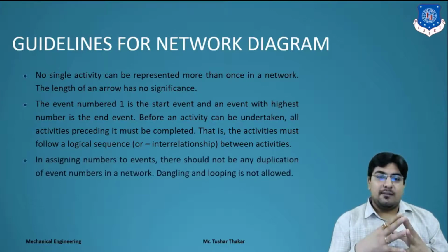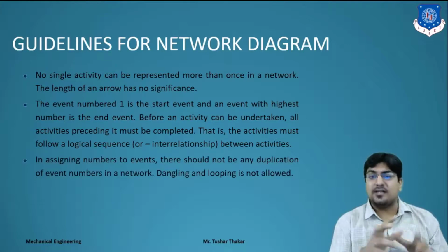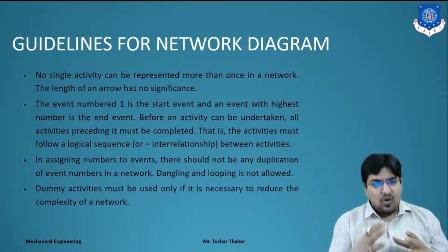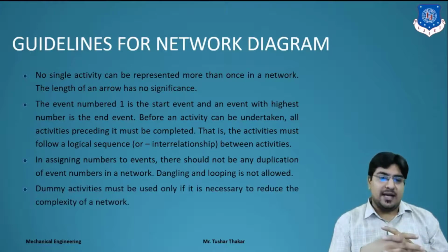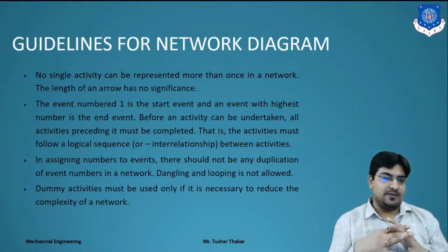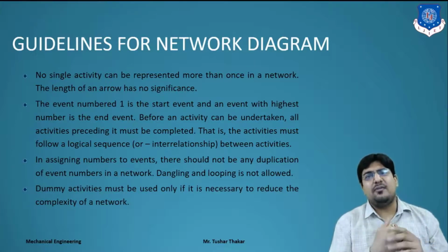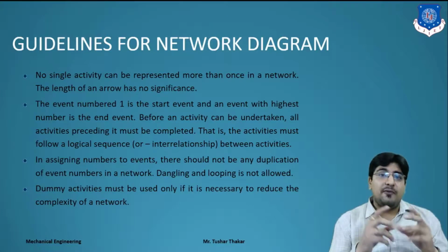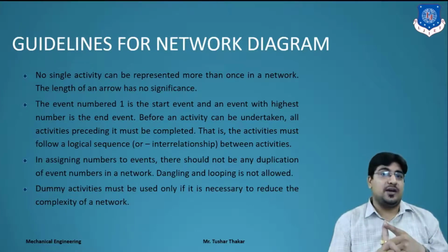In assigning numbers to the events, there should not be any duplication of event numbers, as already discussed, to avoid dangling and looping, right? A dummy activity must be used only if it is necessary to reduce the complexity of the network. When we use a dummy activity, we use it to reduce the complexity of the network. But only when required, at that time we have to use it.